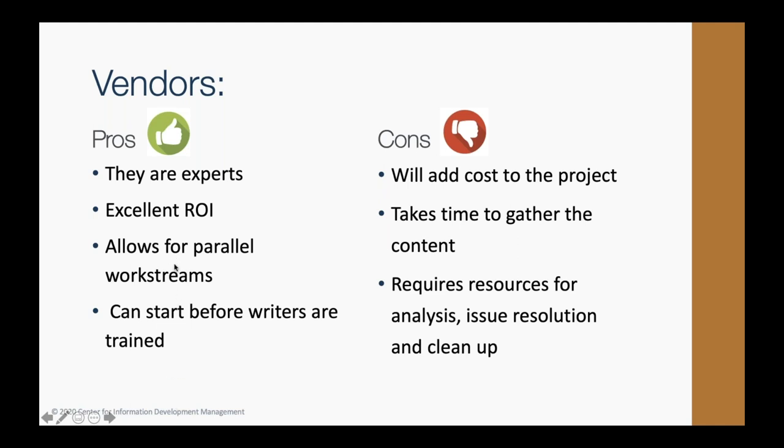It also, and this is really important, allows for parallel work streams. So the vendors can be off working on the conversion, and the core team can be working on some of the other work streams for your migration to DITA or even other aspects of the content conversion. And you can start the conversion before the writers are even trained.